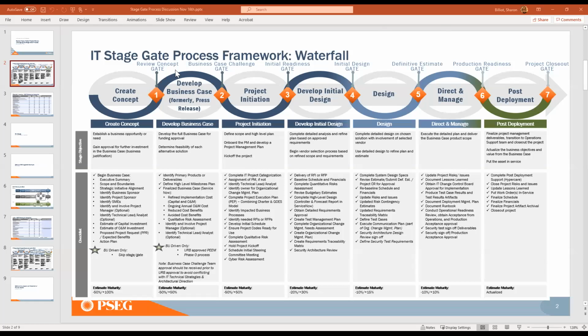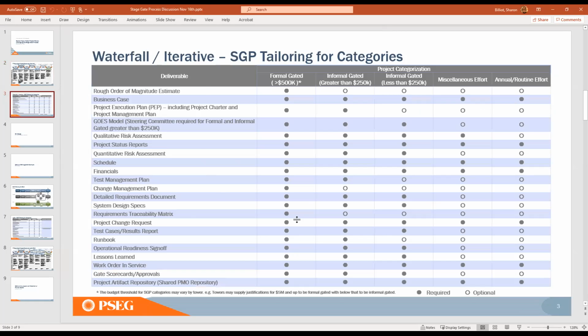So just if there's any questions about how to categorize this, because as you know, not every project is required to do this level of rigor intentionally, because it's more overhead than some projects may need, especially if it's a routine project. So you do have the option to tailor if it's smaller, not very visible project, less risk, or even routine. If it's just mostly hardware, like a fiber project that we're just doing exactly the same thing in different geographic areas, that kind of thing.